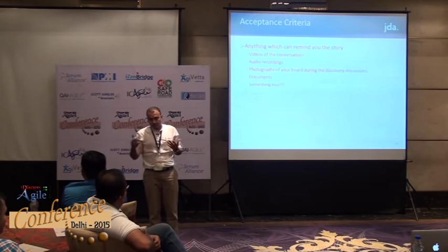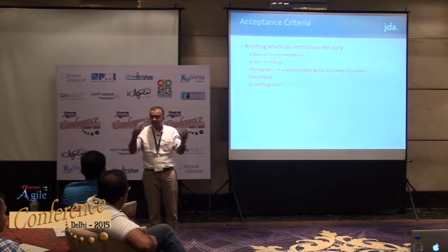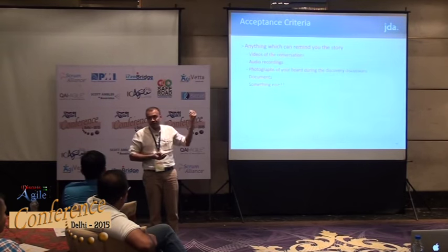I can't define the length of a story. For example, in my organization, what we do is we say that the maximum size of a story is going to be 8 story points. But that may not have any relevance to you, because your story point is going to be a different reference.